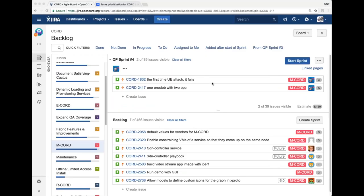For M-CORD, this sprint is mainly focused on the VNF. There is a well-known bug where the UE fails to attach the first time, which needs to be fixed for the release. The second task is fixing shortcomings in the demo — making one UE work and the program inside work with two EPCs, which is currently very unstable.